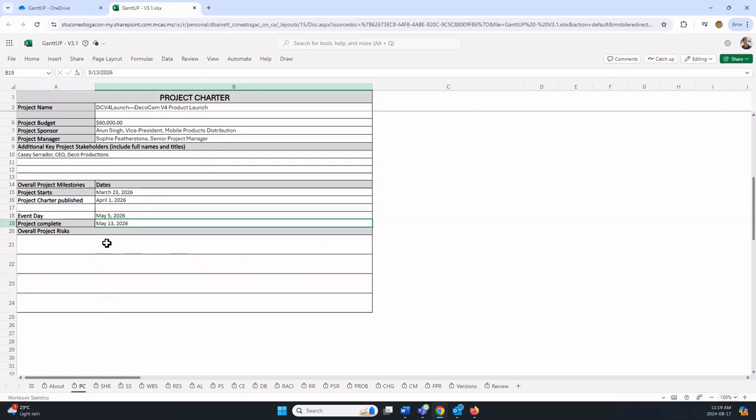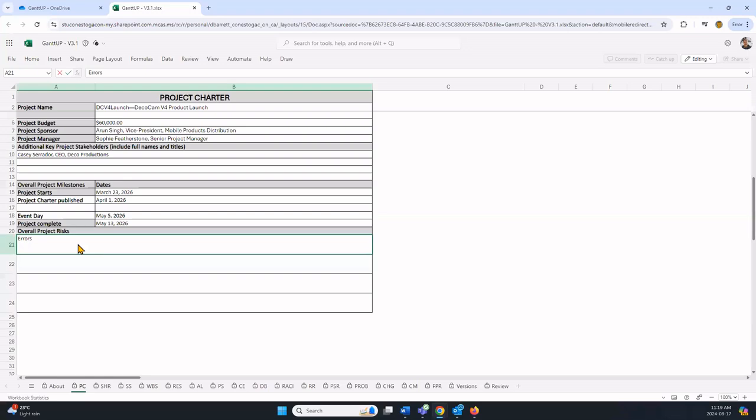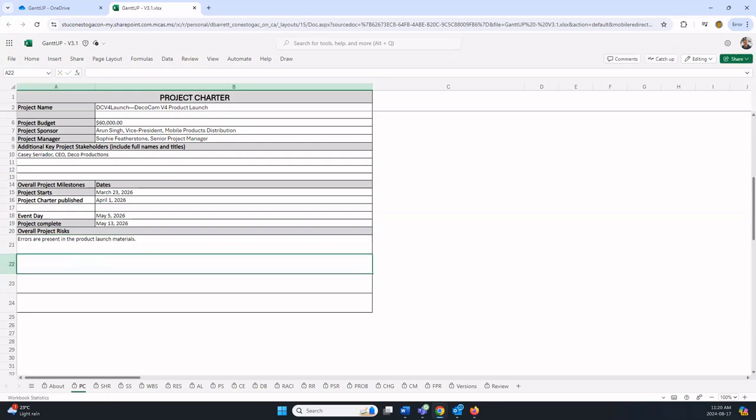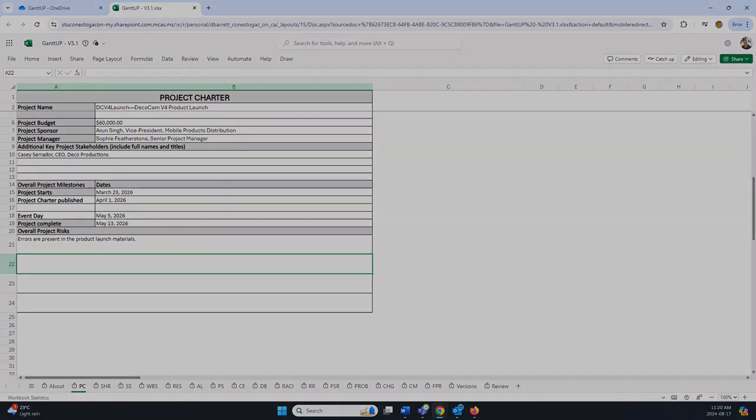Finally, there are room for up to four overall project risks. In the DecoCam example, there were two listed. One was errors are present in the product launch materials. You can enter up to four, but I'll just enter the one. That is the entry of the project charter information into Gantt. Thanks for watching.